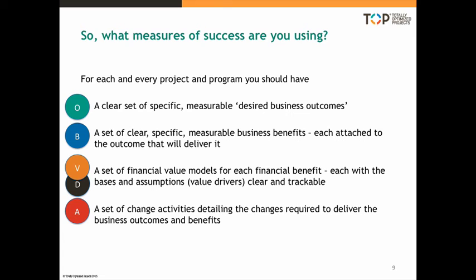You need a set of financial value models for each financial benefit, each with the bases and assumptions, the value drivers, clear and trackable. As we've talked about, the value of the value drivers can change during the project due to factors inside and outside of the project. You need to know when this happens and what the impact on the value is. The project at times could become unviable. The value of a particular benefit could halve or double. You need to know what is available so that when it's time for realization, you can realize the whole value. And a set of change activities detailing the changes required to deliver the business outcomes and benefits.